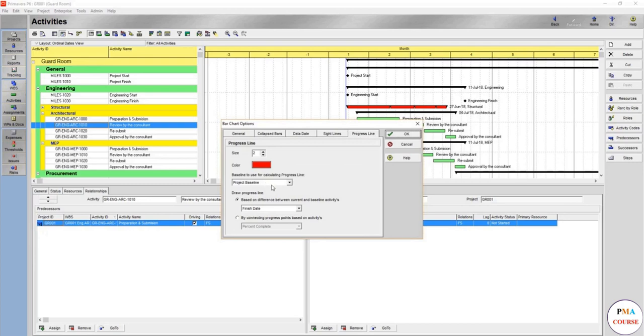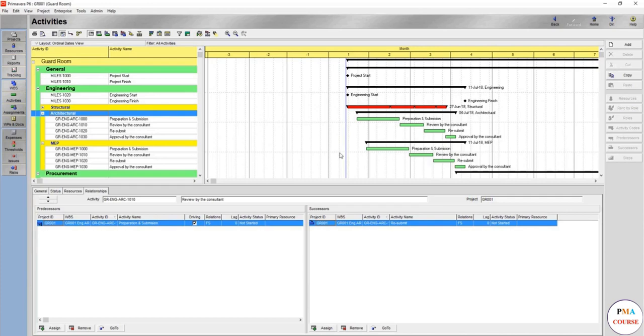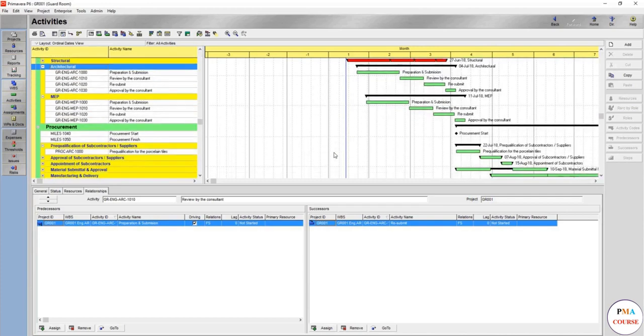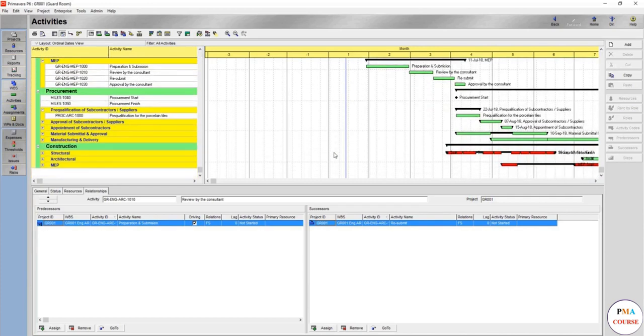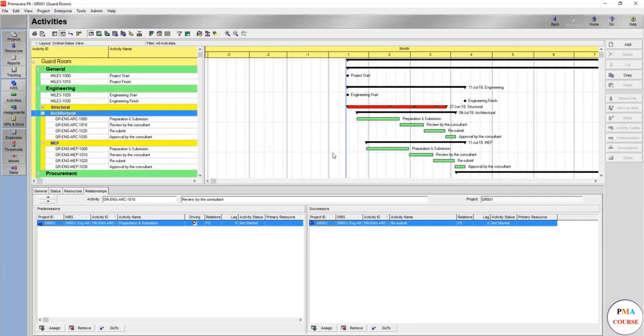What's the progress line? It's when updating, it shows what's ahead, what's behind. It's a red line. While updating, it makes things clear on the status of the project. It gives you a fast and quick view for the status of the project. So now the bar chart is finished. Congrats, go on to the next lecture.